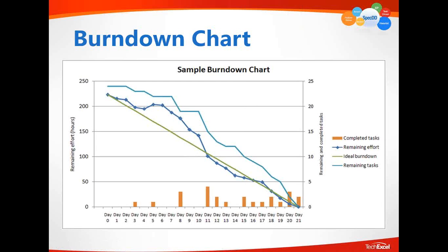So, if you think about the burn down report, it represents how the team makes achievements on a daily basis to finish all the task workload. And if you think about the working software being delivered to the end user and becoming useful, then you would conclude that on day 11, if the working software gets delivered, then some of the functions representing these finished tasks can be used.